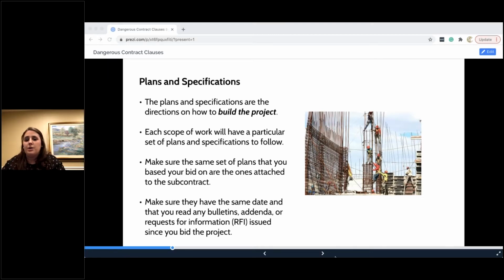I know a lot of these bigger projects offer things like portals where you can go in and see new iterations of plans and specifications. Make sure you're keeping up with that, and that it's matching up to what is in your subcontract and your pricing, and if not, asking for the appropriate change orders. So it has to be a very hands-on evaluation of what's coming down from the top of the project down to you, not just you managing your people and your scope on the project.